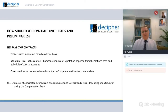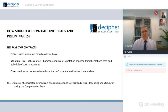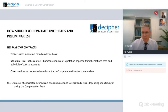Under the NEC, rather than making a claim for actual costs, you're required to make a forecast of your anticipated defined costs, which could also be a combination of forecast or actual costs depending on when the compensation event is being priced.